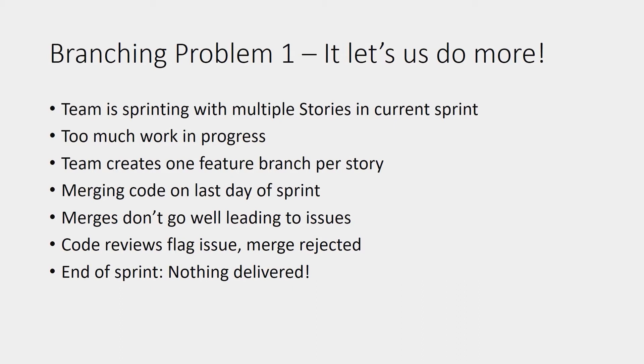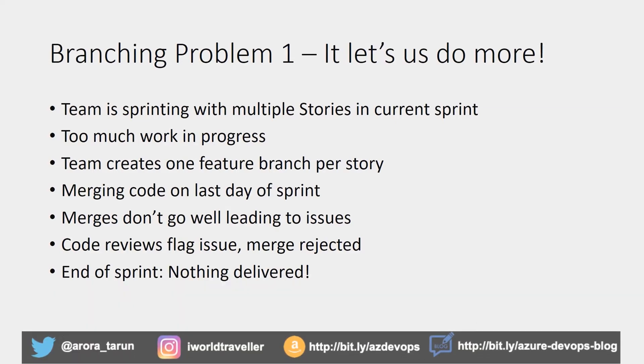On the last day, when they start to merge the changes back, code reviews flag issues and merge conflicts arise. At the end of the sprint, nothing's delivered. This is a classic example of using Git branching to create more parallel work streams and then paying the price of not being able to roll up those changes in time to deliver the features committed to business users.